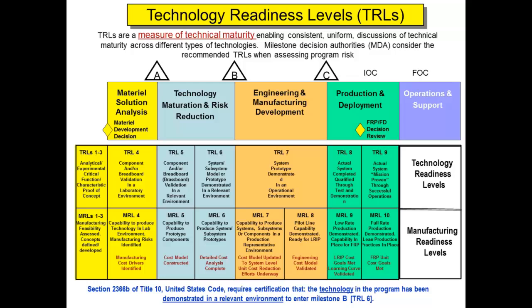So force protection and survivability, congressionally directed, so that the performance characteristics for force protection and survivability must meet a certain threshold. You also have sustainment, which is the reliability of it, the ownership cost of it, what's it going to take to sustain that piece of equipment, and then it has to be net ready. So interoperability compliance means that if you buy a radio, it's got to be able to talk to all the radios. Then you also have 2 selectively applied KPPs, system training, engineer efficiency. But it's really those KPPs, those measurable and testable attributes that are critical to the piece of the equipment performing its function. So that's what a KPP is.